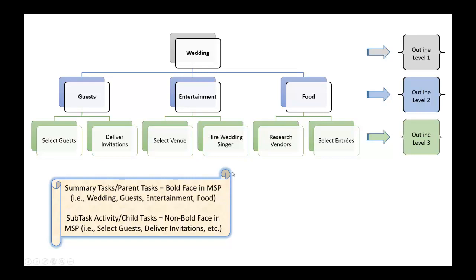Another thing to note is that our summary tasks are portrayed as nouns, and our child tasks always have a verb associated with them. This better enables the viewer of the schedule to understand what activity is occurring and what action is being taken.